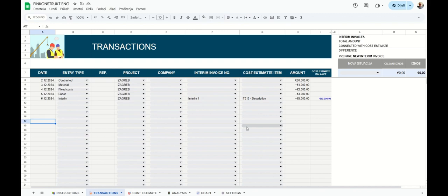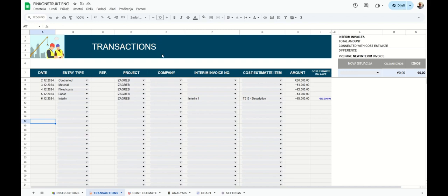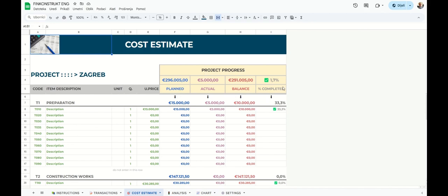Okay. So we're feeding the system with all this accurate data. So then what kind of reports does FINKONSTRUKT give us back? What's the benefit of all this record keeping? So there are a few reports that I think are really important. First you have the trokovnik itself. This actually allows you to compare your original budget to how much you're actually spending. And it can even warn you when you're getting close to those limits you set. So it's almost like an early warning system for going over budget. That's going to be super helpful for those project managers who are trying to keep things on track.